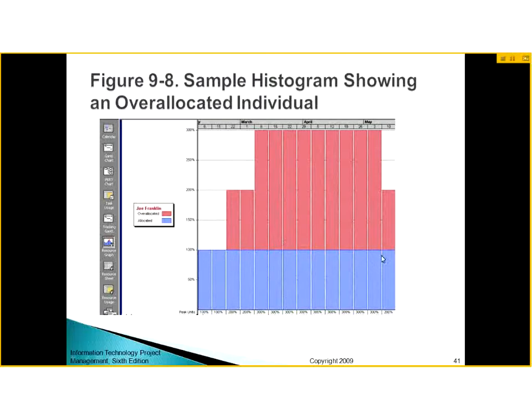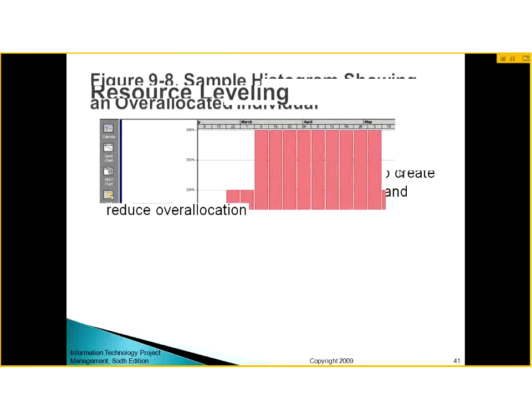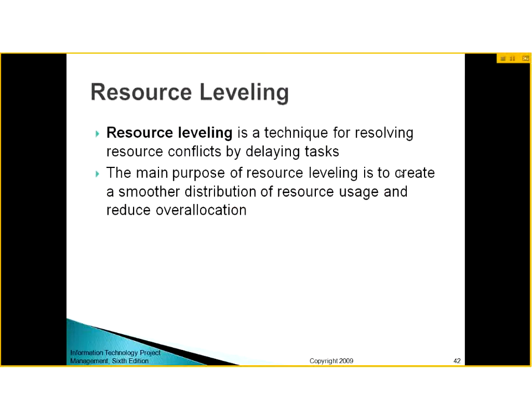So Joe can work maximum up till this line, but you have used Joe in other schedules as well when he is not available. So this is over-allocated. Now you perform resource leveling to solve many problems and reduce over-allocation.